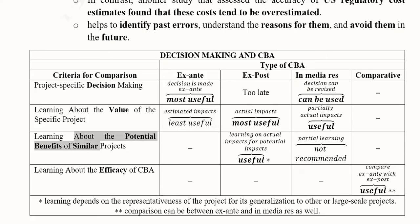The third criterion is learning about the potential benefits of similar projects. Ex-post analysis is again most suitable, as actual impacts help predict potential impacts for future similar projects. Partial learning is also possible through In Medias Res CBA. Ex-post is the most appropriate type when understanding potential benefits across projects in the same sector or sub-sector.